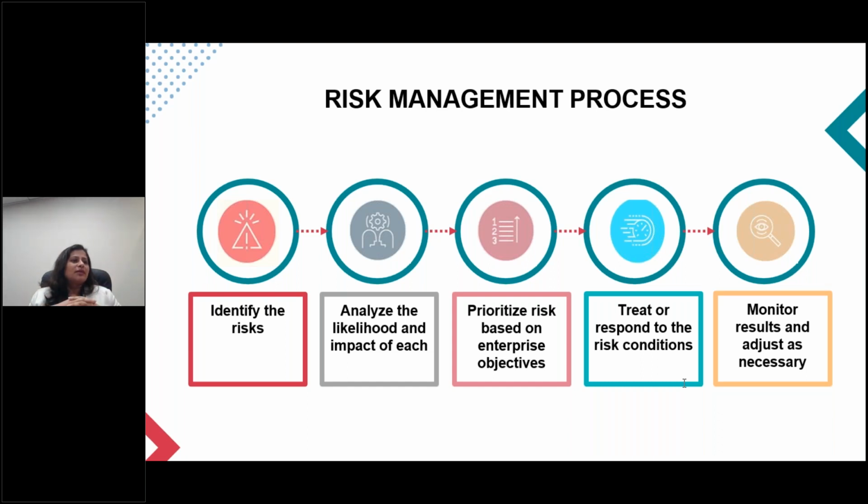A strategic approach can be identifying risks against key company objectives. A good way to start. Risks relevant to the objectives are considered and evaluated, which results in a small number of risks. Having a risk register that is too large is quite hard to manage, so it's important to finally prioritize them. So identifying key risks is important in order to allocate responsibility for management of these risks. Ultimately, someone needs to track it and monitor it.